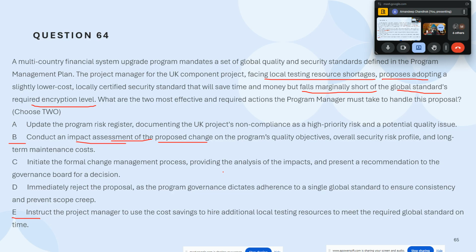Even if I talk about the cost part, in today's projects, if we are saving something, it becomes a double-edged sword. If you are saving on some deliverables or some cost, the client immediately asks to reimburse them for that cost, because still claiming that cost would be an undue advantage to the contractor. So they ask us to raise a negative change order sometimes.